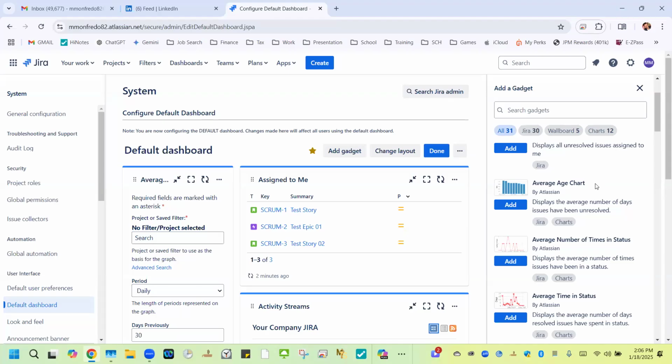And what that means in terms of business days, because we're not counting weekends, is anywhere between 10 to 15 days. And the average chart will actually display this in the bar chart you'll see later. This is very important. If you see huge spikes in your bar chart where it's going up, that's saying things are taking longer and longer and longer to be resolved. And maybe there's a reason for that, or maybe it's an insight that you weren't aware of. But once again, insights for better outcomes. This is going to give us insights.